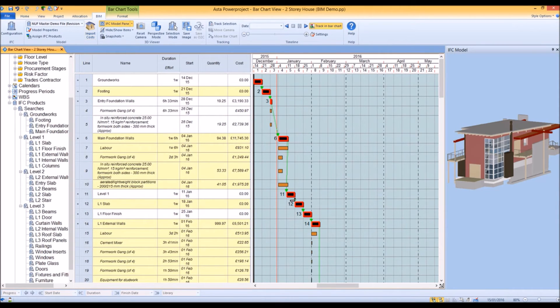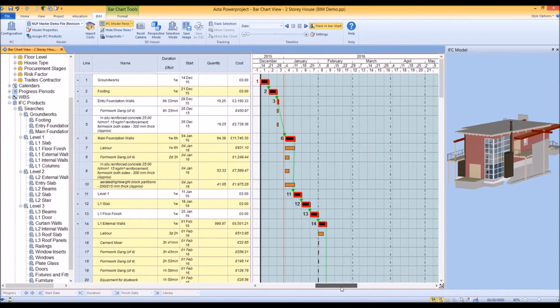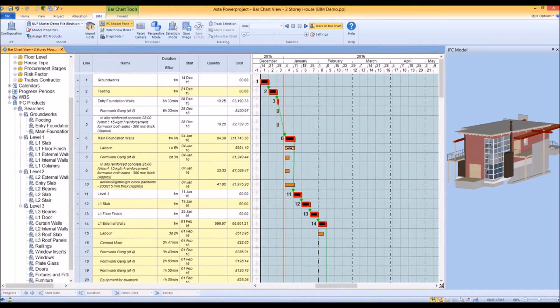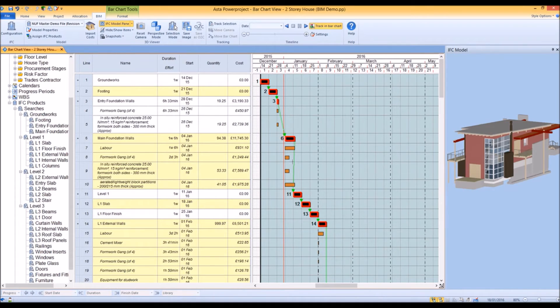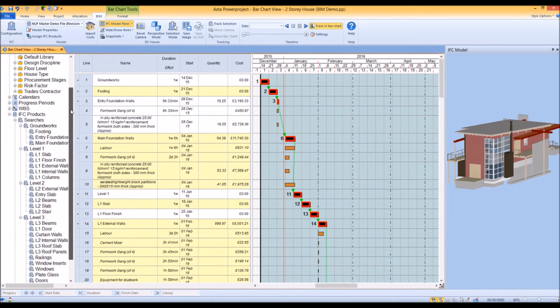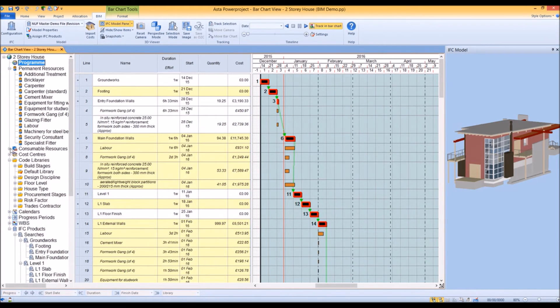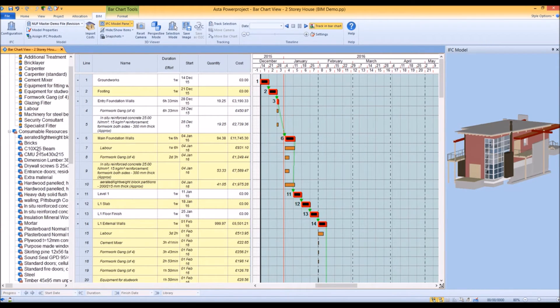We can see that Power Project creates resource allocations and cost allocations according to those objects. It also brings in the cost and quantity information and creates permanent and consumable resources.